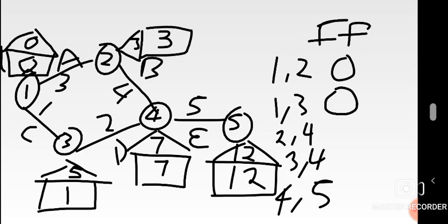Then minus duration. Duration is that activity on the arc, the figure on that line connecting the 2 nodes. That's the duration. So you are on 3 minus 0, 3, then 3 minus 3 again, because the duration is subtracted, giving you 0. That's the 0 you're seeing there as a free float.